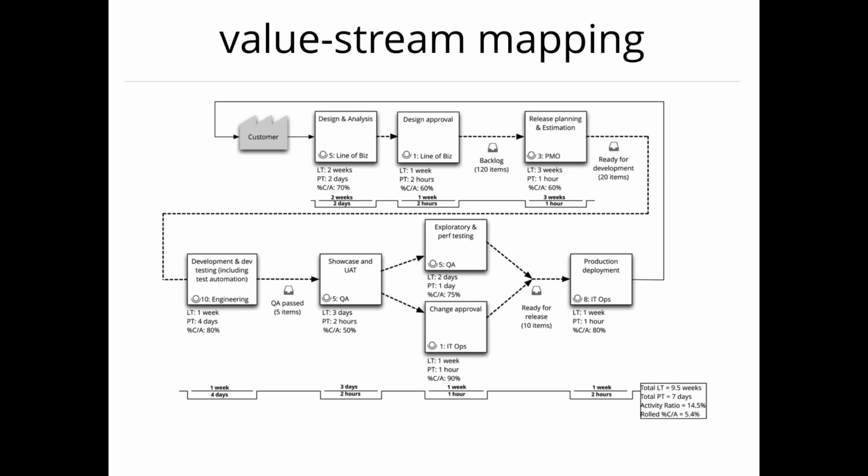So just by getting together and spending a couple of days analyzing a particular value stream for one product or service within your company is a great way to get started, and then getting the people who can change these processes together to design a to-be value stream map of how we want the value stream for this product or service to look in 6 to 9 months is the next part of that process.